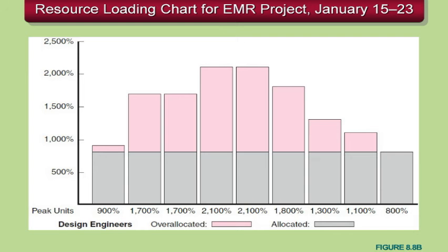You can tell Microsoft Project how many resources are available, and it will tell you where your overallocations exist, for each particular time period, for activities, lots of different ways to take a look at the reports. Here it's just where the resource problems are on particular activities, where they're overallocated for design engineers.